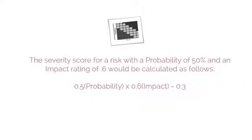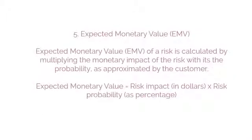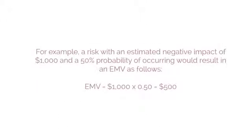For example, the severity score for a risk with a probability of 50% and an impact rating of 0.6 would be calculated as: 0.5 × 0.6 = 0.3. The fifth technique is Expected Monetary Value (EMV). EMV is calculated by multiplying the monetary impact of the risk by its probability as approximated by the customer. The formula is: EMV = risk impact (in dollars) × risk probability (as a percentage). For example, a risk with an estimated negative impact of $1,000 and a 50% probability of occurring would result in an EMV of $1,000 × 0.50 = $500.